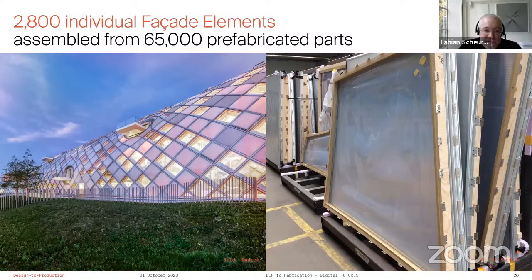The whole facade altogether is also assembled from about 65,000 prefabricated parts. Most of them were CNC fabricated directly from planning data, and then prefabricated as facade elements offsite in Germany, mainly shipped to site more or less just in time and then hoisted into place.